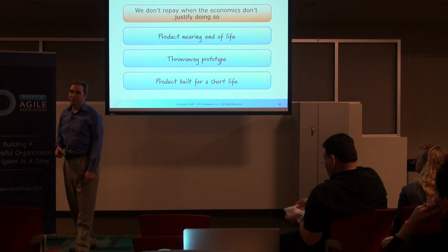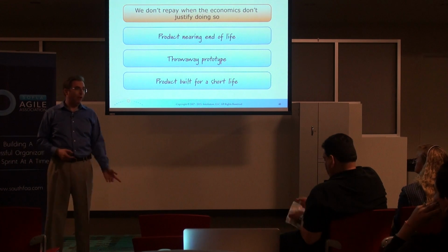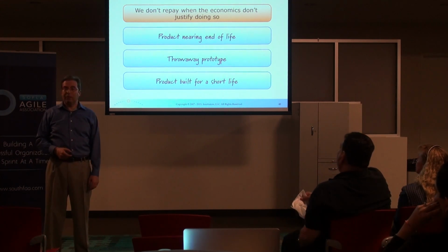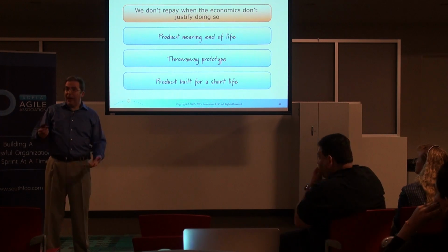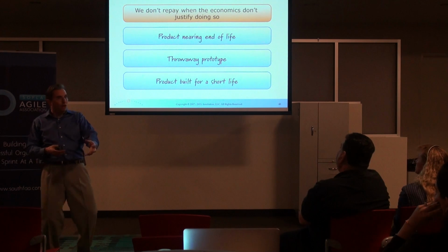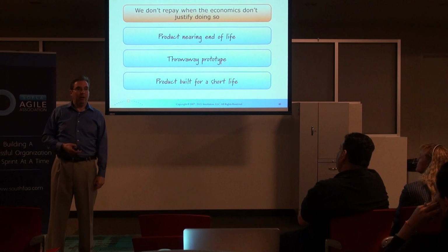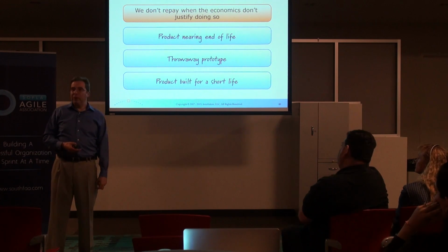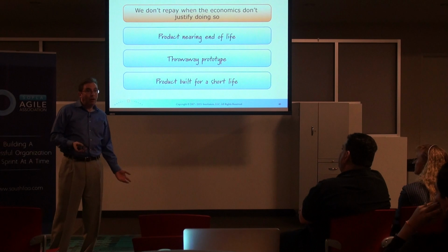Or maybe we're just doing a throwaway prototype. Proof of concept, study, experiment, spike, use your favorite term. They all mean the same thing to me. The act of buying information. Well, if you're buying information, the value is the information, not necessarily the artifact you created to acquire the information. So if you want to cover a lot of terrain on an avant-garde, research or prototyping mission, it's best to tell people up front, we're just going to throw away the prototype. That wasn't the valuable asset. The valuable asset was knowledge.